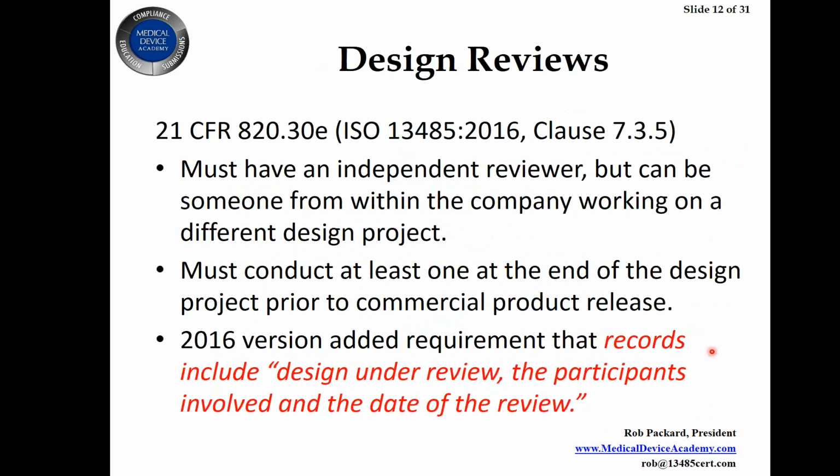For reviews, one of the requirements is to have an independent reviewer, but a lot of people think independent must be outside the company. It isn't true. You can have somebody inside the company be an independent reviewer as long as they didn't work on that phase of the design project. You should have at least one design review at the end of the project before commercial release.